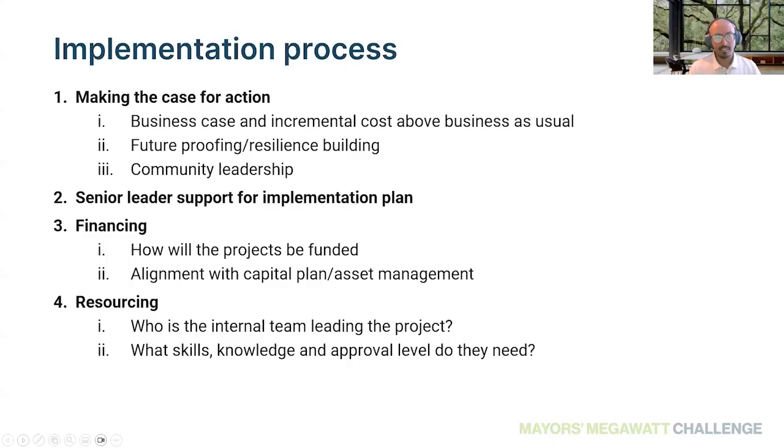And obviously, we all understand that financing is going to be one of the biggest barriers that we have, is how they get funded. Making sure that you're finding incentive programs, working with provincial or federal programs or service providers, trying to align with your capital plan, your asset management, making sure that you're actually, like Sean had mentioned earlier, replacing things as they're needed, understanding how things are going to be coming up for replacement in the future, setting these things into phases and stages, seeing how you can accomplish all these tasks in a digestible way. So you're not doing it all at once or overwhelming any one system or portion of your organizations or your municipalities, and able to accomplish these goals over the time period that you're aiming for.